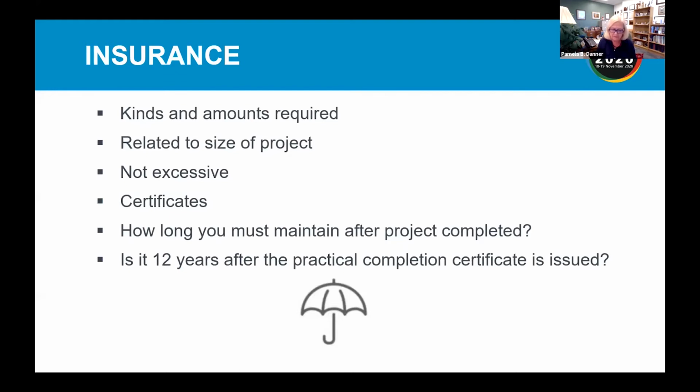However, some of the typical insurance coverages, at least here in the US, are commercial general liability, an umbrella liability that's over and above your commercial general liability. In the US, workman's compensation by statute is required. It may not be required in Europe. And professional liability. This is if, for example, the client comes back and says that your services do not meet the standards of a professional lighting designer and something's wrong, something happened. This would cover you as a lighting designer and your staff.